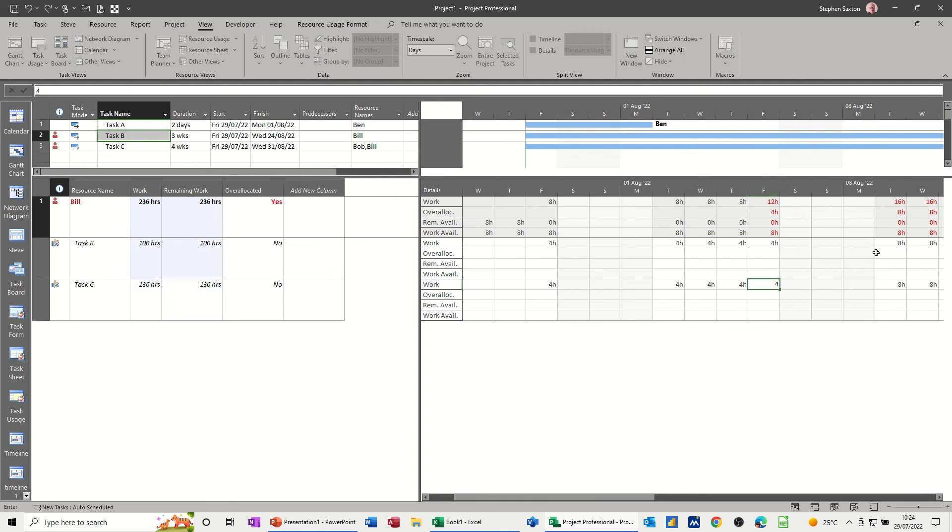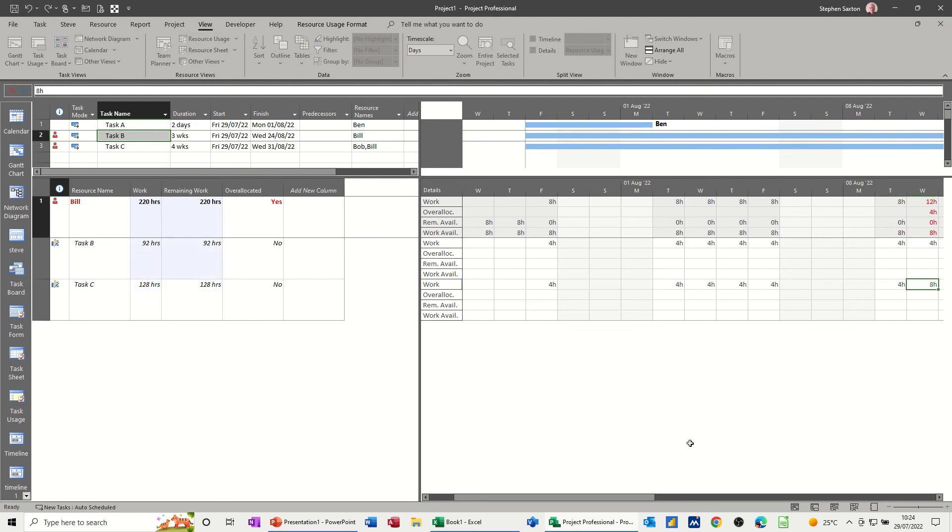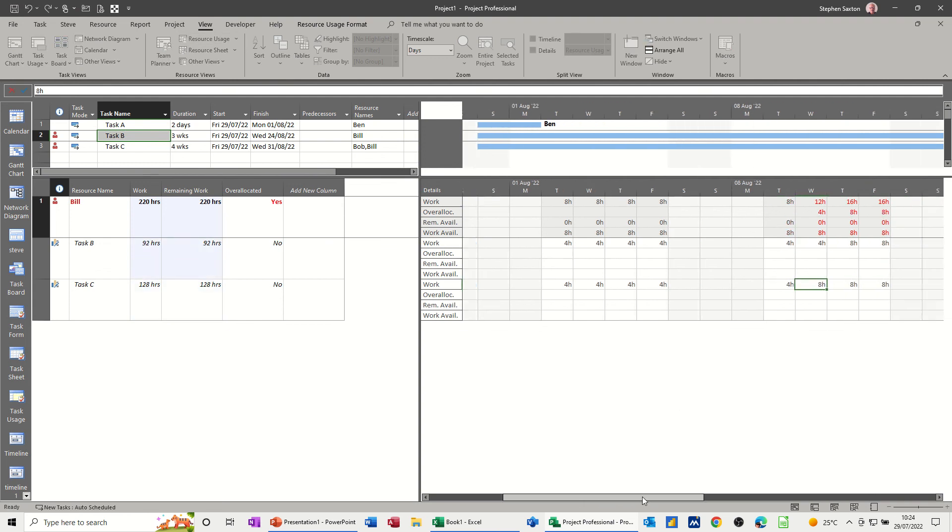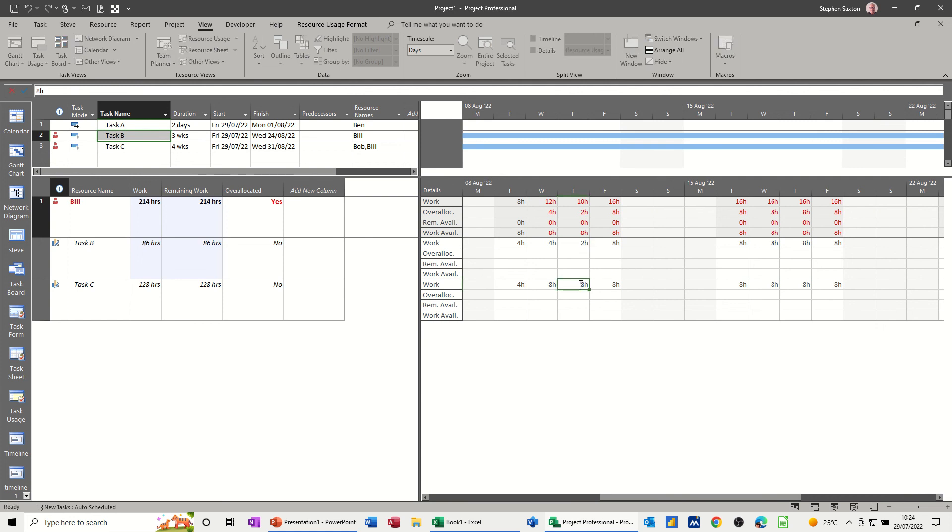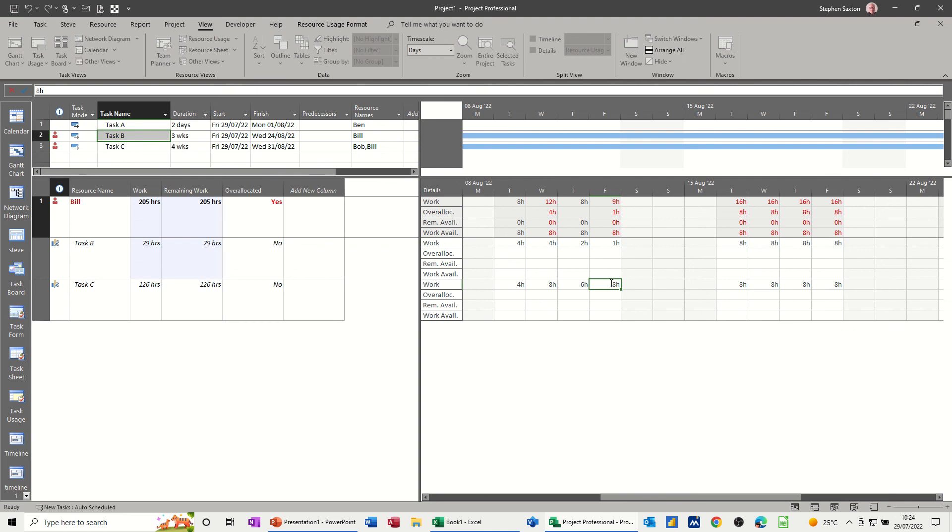Because sometimes people attach resources and leave everything as default, which basically would allocate a person of eight hours on a task. Let's go two and six just to be different. Let's go one and seven to be different. Again, as long as it's within eight hours.